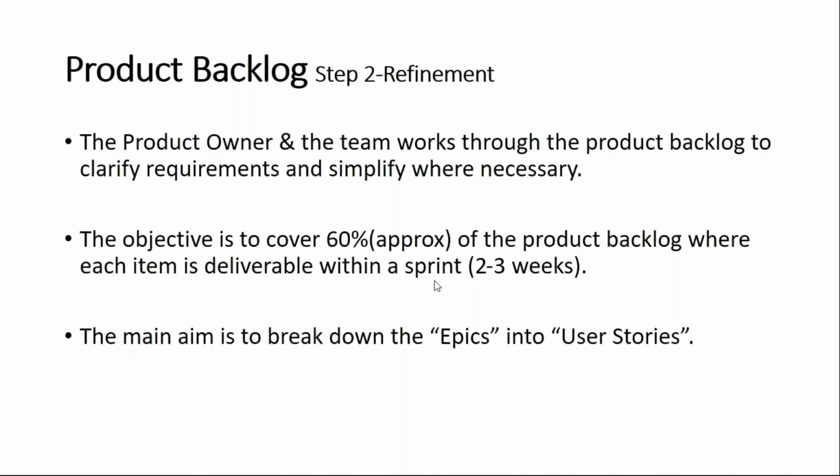But this 60% doesn't apply in an active sprint. I was just giving an example, Farah: when you work as a scrum master along with the product owner, when the team is working on the 10th sprint, basically both of you will be working on the 12th sprint.